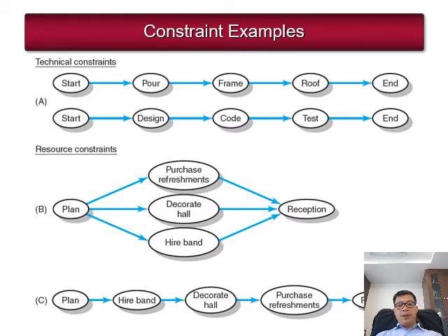But let's see the difference between B and C. It might be because of the time constraint. If you have a time constraint but enough people, you can do model B. But in case you have time but a constraint with people, you will do model C, where one person does all the jobs one by one.